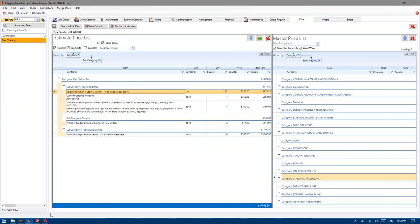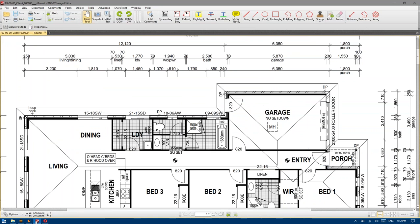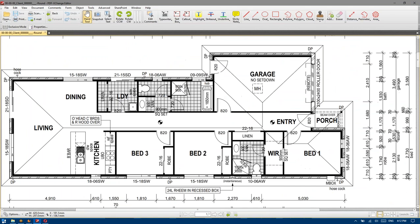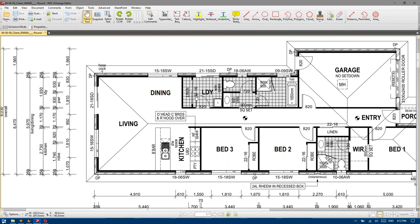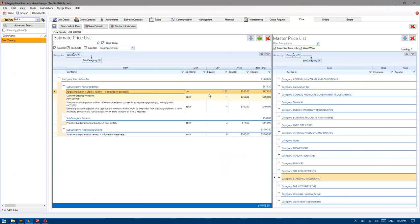Now this cladding allowance is absolutely no cladding, so we just delete. Additional linen store or pantry — one walk-in robe, one robe, one robe, one linen. So this house has two linens, so that should be getting charged out. The linen is the same length as the laundry, which is 1.93.